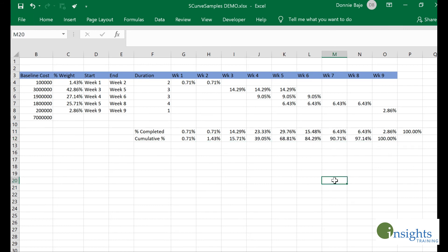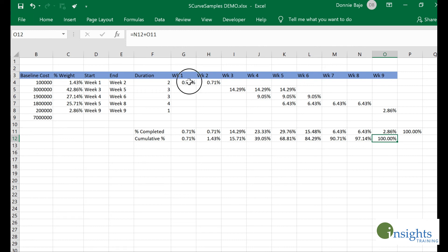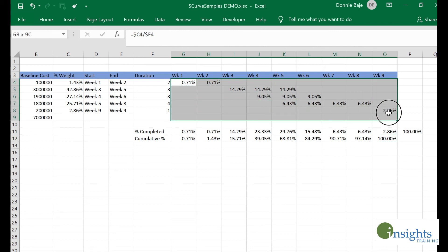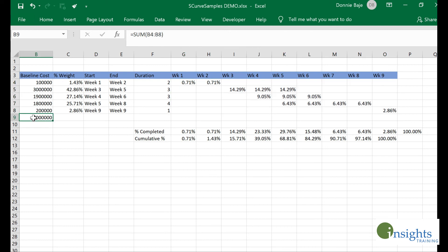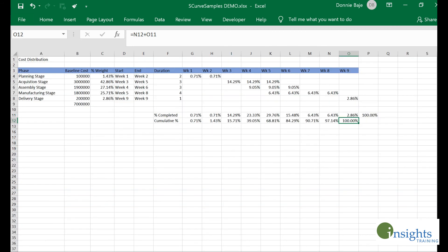You know you're correct if by the last cell you will also get 100 percent, because again, this is simply a distributed percentage of a whole, so you will get 100 percent at the end. Now we are actually ready to plot our S-curve.